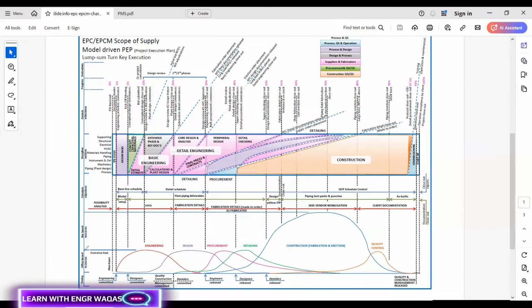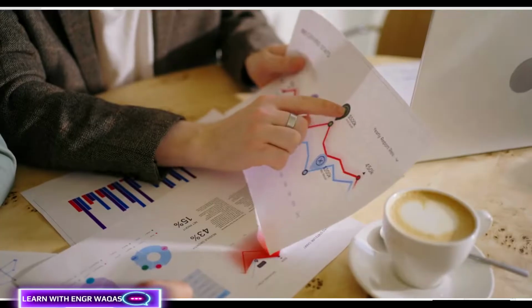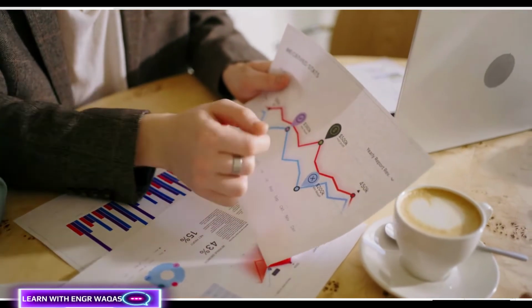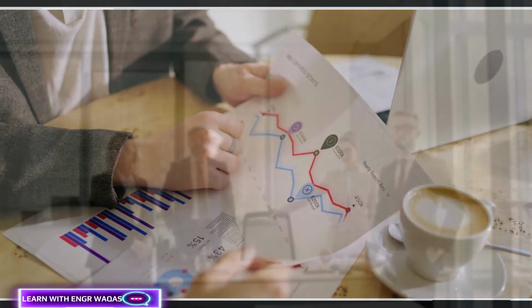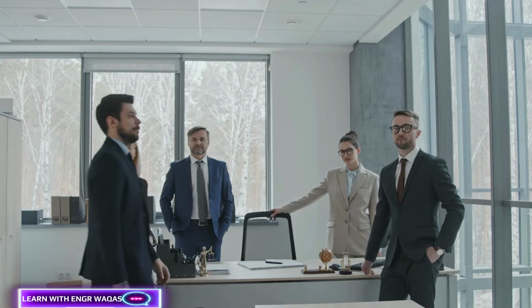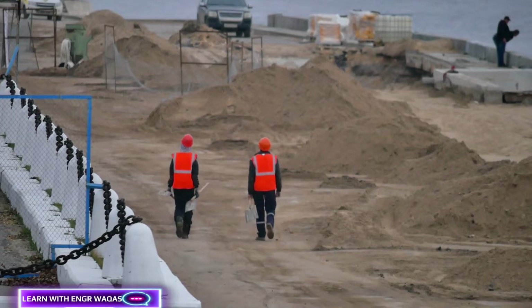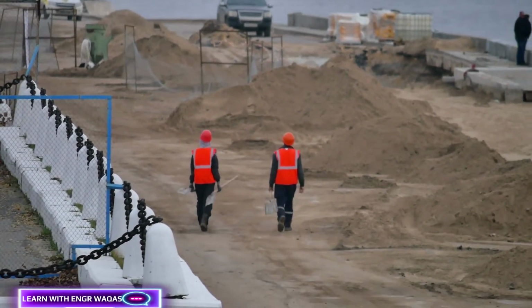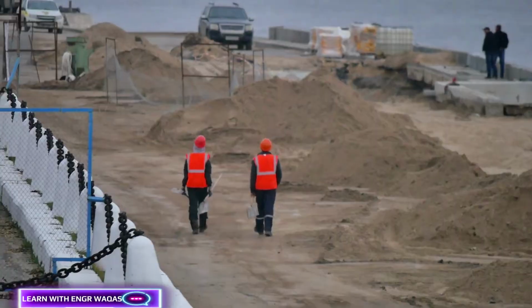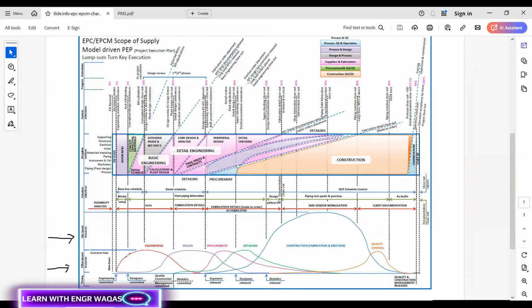This is the office bound. Whenever your project is going to start, it is obvious that you are not going to start from the site area. You have to document information, details, different kinds of reports. So obviously people from the office area start work first, and then site people are going to mobilize on the site area. These two represent what kind of peak I require in which phase. If I talk about office bound, you can see the graph is touching the peak, okay? And these are the engineering people.